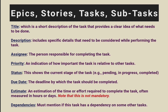Due date: the deadline by which the task should be completed. Estimate: an estimation of the time or effort required to complete the task, often measured in hours or days. Note that estimation of tasks is not mandatory — some teams estimate tasks, some do not, and it is totally up to the teams depending upon their practices. Dependencies: one must mention if this task has a dependency on other tasks, meaning if some other tasks need to be completed before this task.